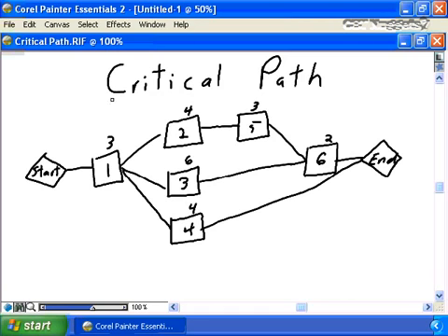One of the most effective things you can do as a project manager to effectively manage your plan is to manage the critical path. What's the critical path? The critical path is the path through your project. I've shown here a dependency diagram again that has the longest duration, or that effectively determines the end date for your project. So we see we have 3 paths through our project.